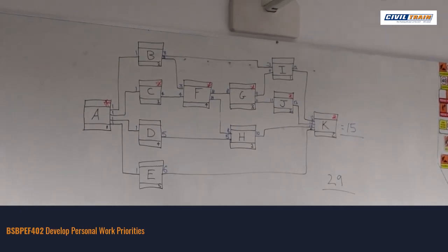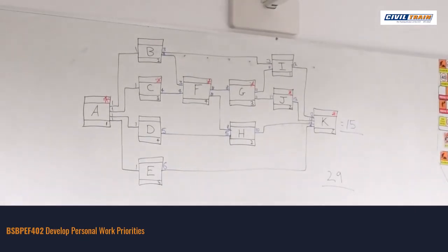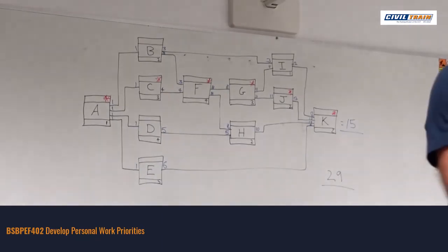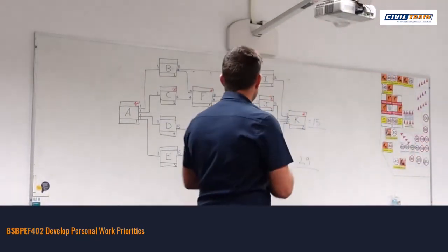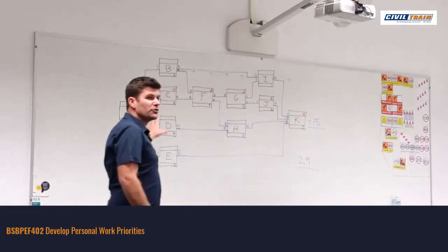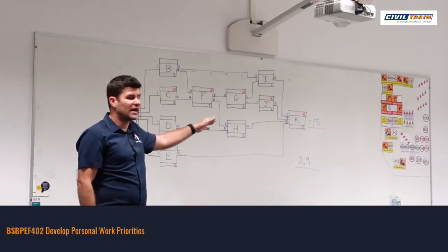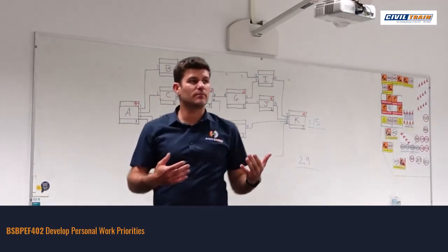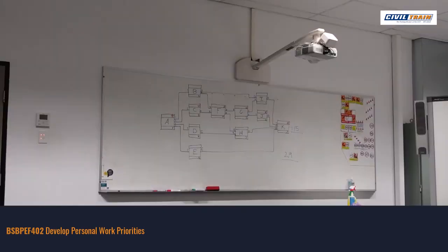That's your critical path method. Now, if you were to input this data, so if you were to input the tasks, the duration and the dependency numbers, exactly how we've presented on our table, if you were to enter that into Microsoft Project, it would automatically do this process behind the scenes, calculate it, and it can actually show you the critical path based on those algorithms, that calculation.